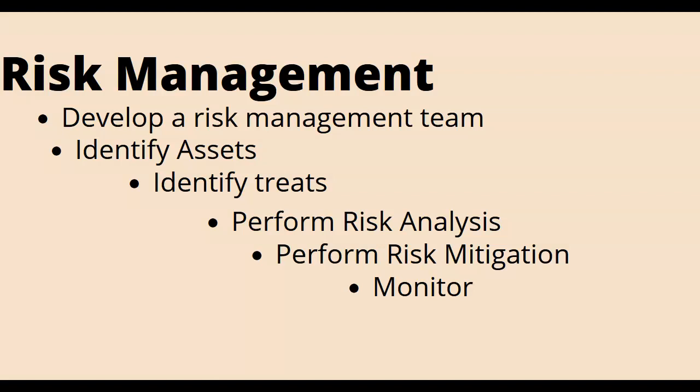If the risk is under acceptable condition, it's not threatening. The risk is there, but the impact is not so high. Once you identify that it is high risk and has high impact, then we have to perform risk mitigation.